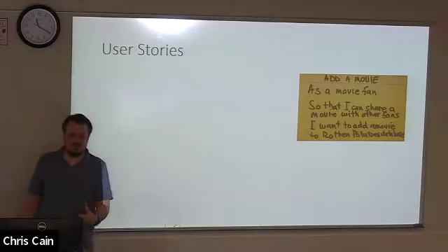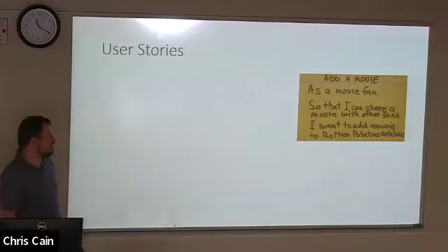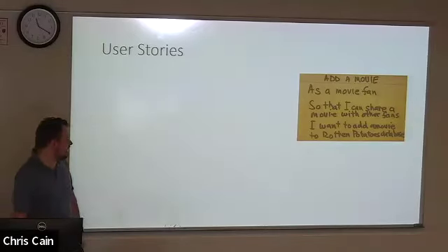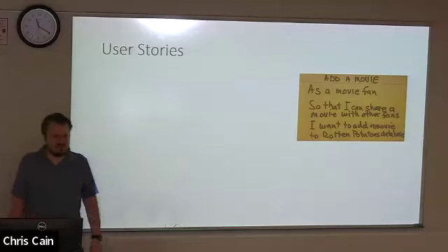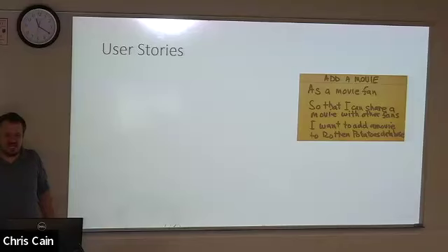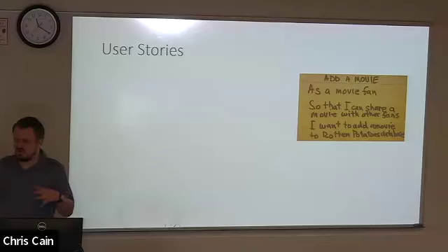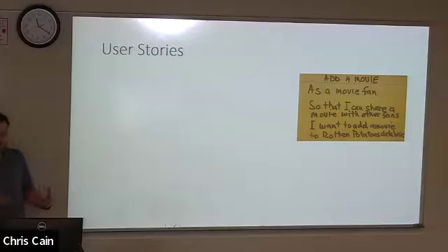So to add a movie to whatever this happens to be: as a movie fan, I want to add a movie to the Rotten Potatoes database so that I can share that movie with other fans. It puts you from the perspective of one of the stakeholders of the product that you are producing.